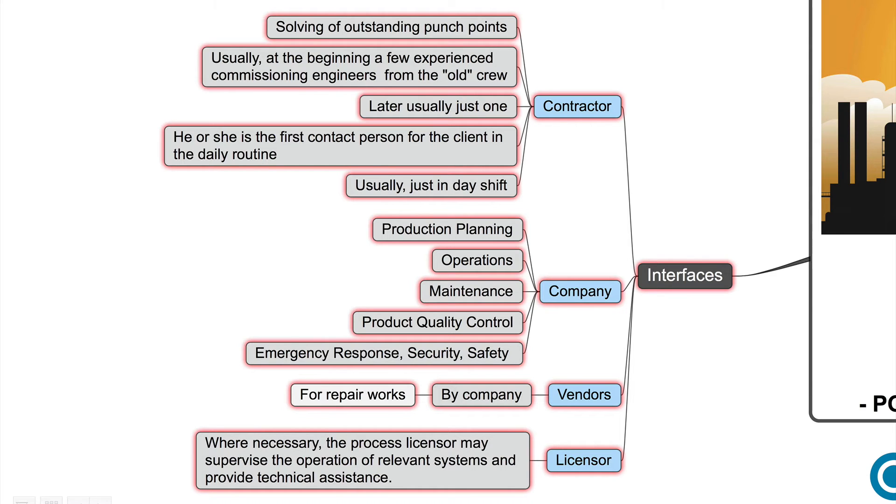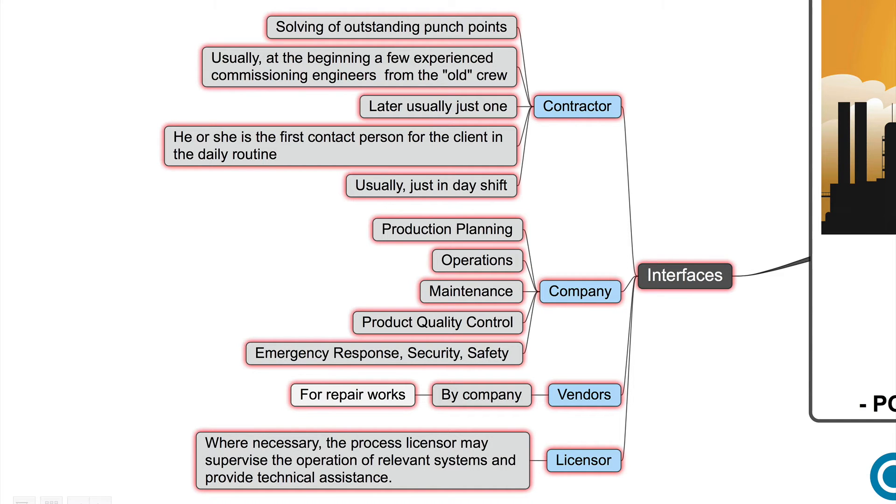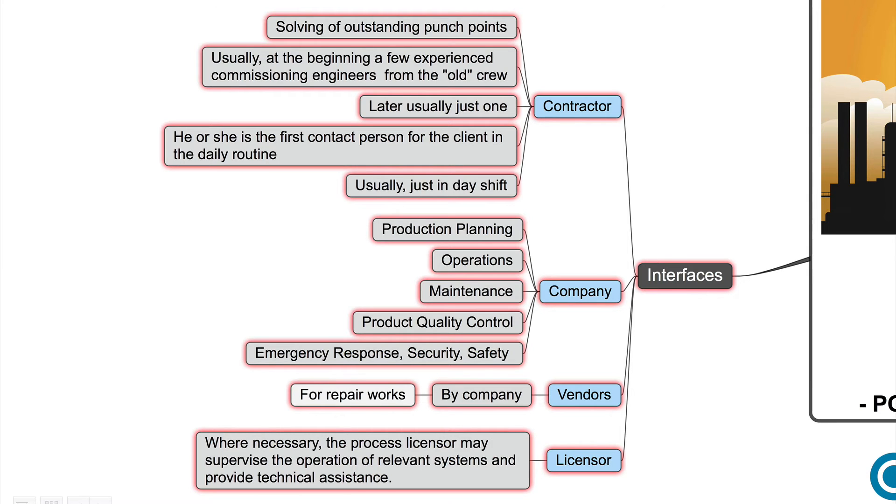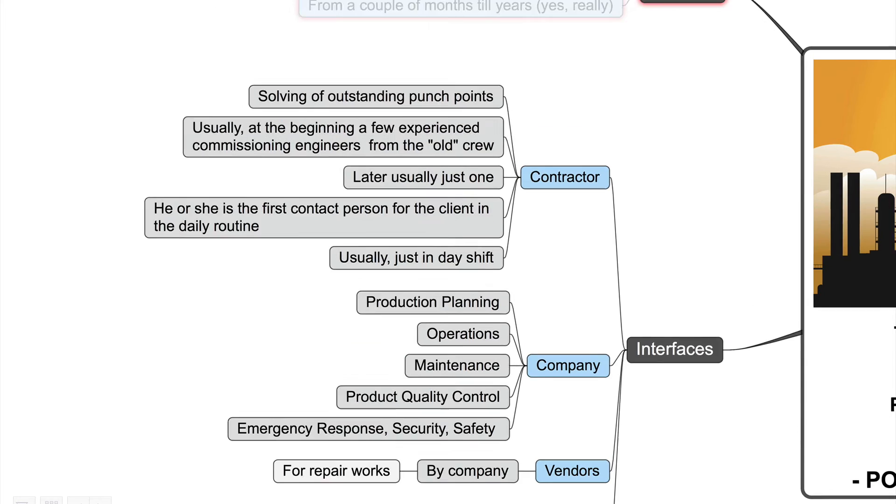The company is responsible for production planning, operations, maintenance, product quality control, emergency response, security and safety. The vendors, they are still managed by the company and mainly for repair works. And the licensor during the post-commissioning phase is there as well. Where necessary, the process licensor may supervise the operation of relevant systems and provide technical assistance.